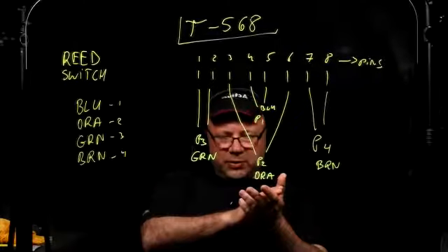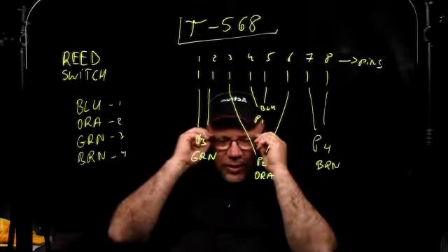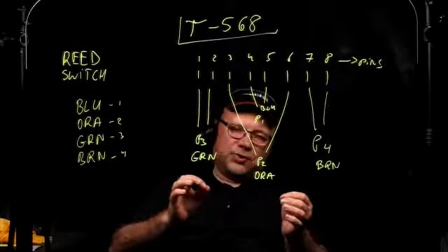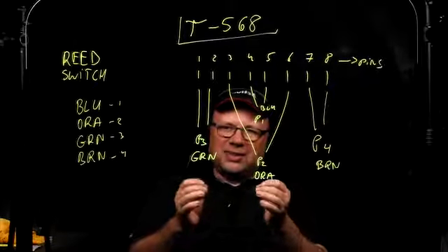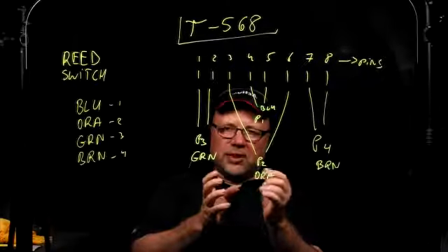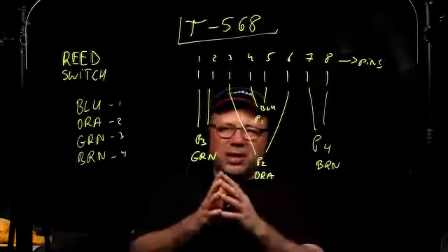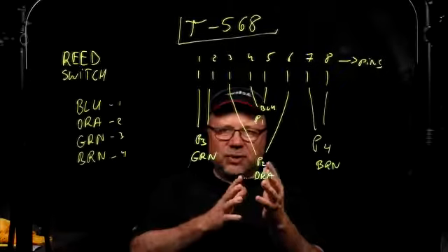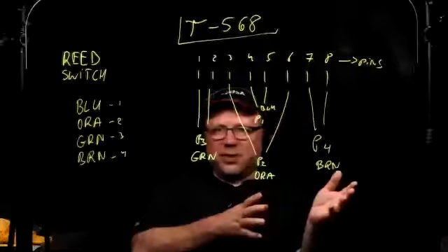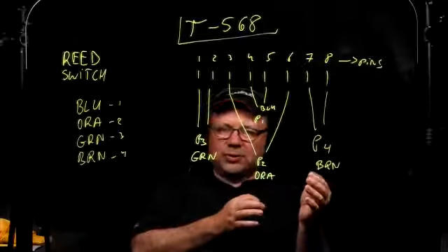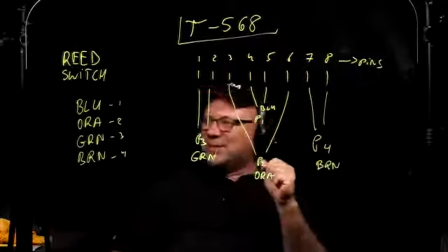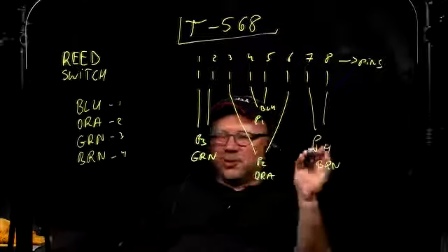But once money is involved, and you're coordinating a project and trying to price things out, then the pressure is on. In a couple of the first jobs that you quote, you're going to be slightly nervous because you don't want to miscalculate something, so that instead of making money, you lose money. And the bigger the job, the easier it is to lose money, because in small jobs you make small mistakes. In huge jobs, if you miscalculate the wire amount or the labor hours, then you can come up with huge differences.